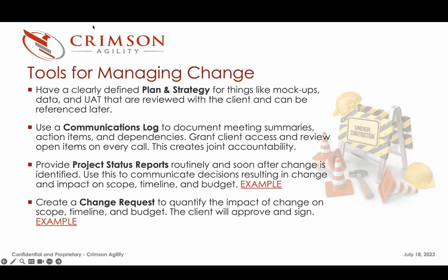You have to be careful about it. In that case, whoever is estimating your tasks for that client has to be aware of it before they're estimating them. And at the same time, you need to be very clear with those developers that, hey, we estimated this at 6 hours, but it really should only take you about 4. We're just putting this here in case you run into issues. But don't put that on the Smartsheets. That type of communication has to be happening internally.